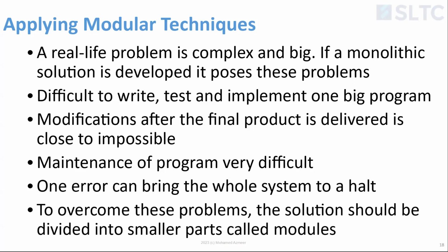Now, if you take a team, take an accounting package, again, as an example. One person may not be able to write the entire accounting package, so you may hire a team of people to build it. Maybe one team will be looking at the cashier's problem, another team at the inventory problem, another team at the general ledger problem, things like that. But then at the end, you need one program, one accounting package with all those modules in hand. So we need a way to control these modules and make sure they all work together.